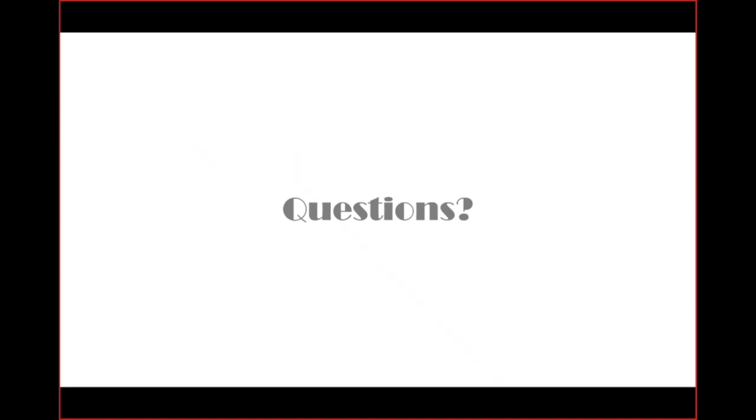We did get some questions, and some good ones. I think we'll have enough time to answer most of them, if not all of them, so let's just dive right in. The first one says, I think this is related to Planner, can you assign checklist items to individual people? Within a Planner task, you can only assign the task. You cannot assign individual checklist items. I have that same problem. Whenever I find a task that has checklist items for multiple people, I break those out into individual tasks that I end up assigning. Nice. Okay, great.